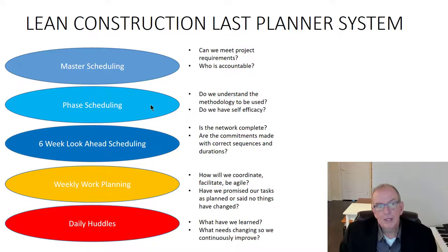And then if we get to the weekly work planning, what are we doing in this next week? Really detailing that out, collaboratively engaging the people that are involved in the project. They have a lot more expertise than you do in their specific areas, but they're going to have also, through this engagement, a lot better understanding of who's their customer, what are they trying to do to satisfy them, and what do they need to be able to do their work. And that gets into better efficiency, better collaboration in the process, and less adversarial relationships.